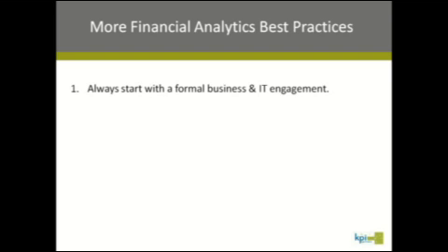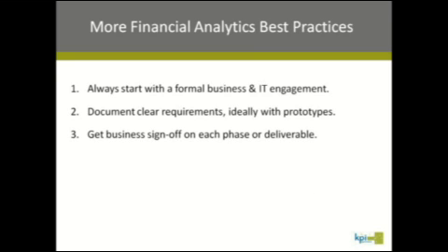Really formalize it through the Vision Workshop, as well as structured touch points during the project. Document clear requirements. Ideally, prototyping can be extremely helpful when a requirement isn't 100% clear. Get business sign-off on each phase or deliverable. So it really protects IT and the business to make sure everybody's on the same page.